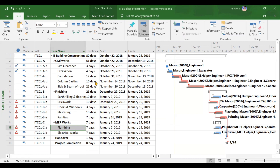There is one feature called earned value management. Through that particular feature, you can calculate several parameters and indicators related to your project, like cost performance indices and schedule performance indices. These parameters can help you assess the health of your project. You can also create several reports like cost reports, resource overview reports, and resource over-allocation reports. These reports you can print and present to your boss so he can get an idea of how your project is performing in aggregate.